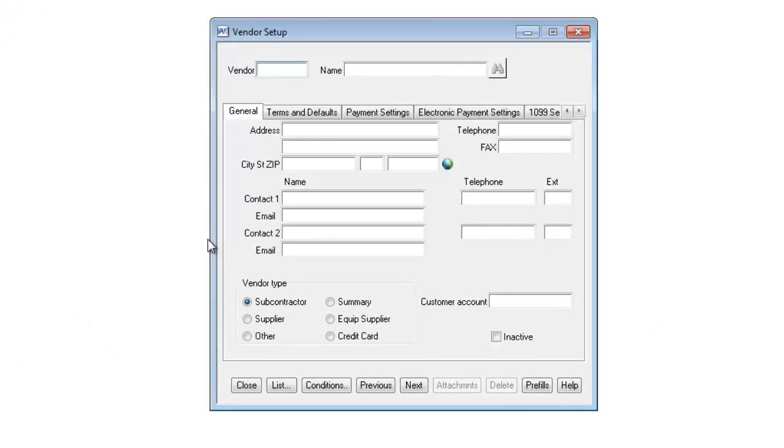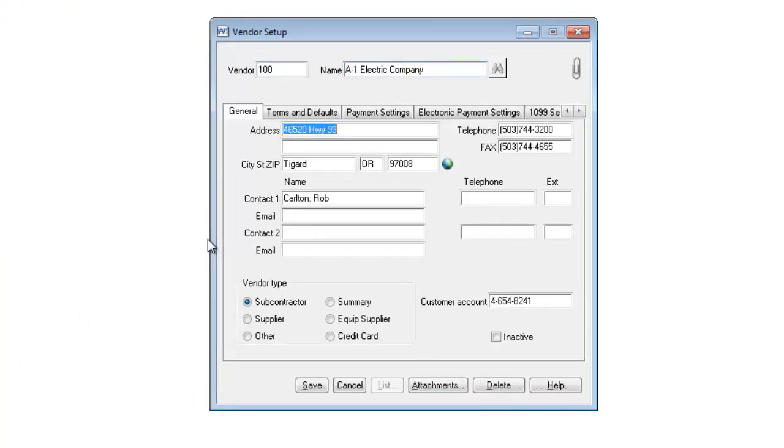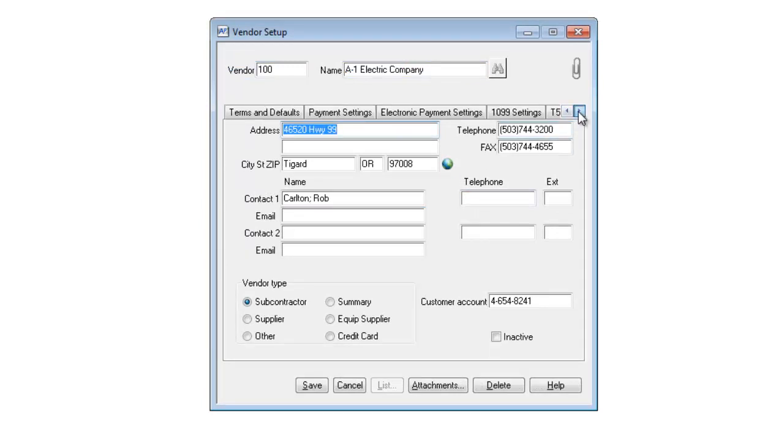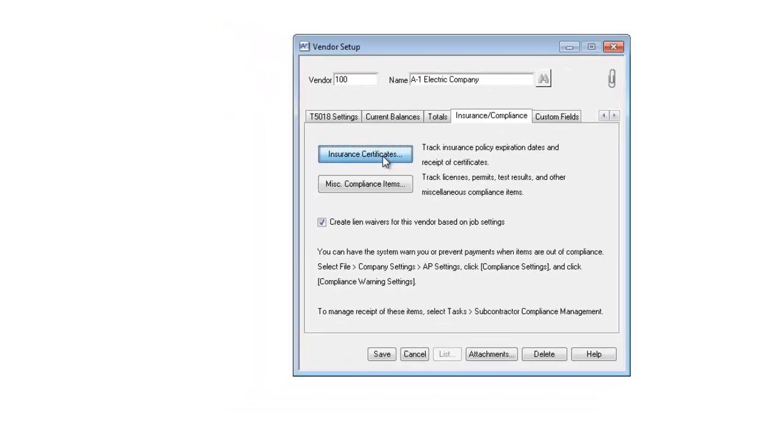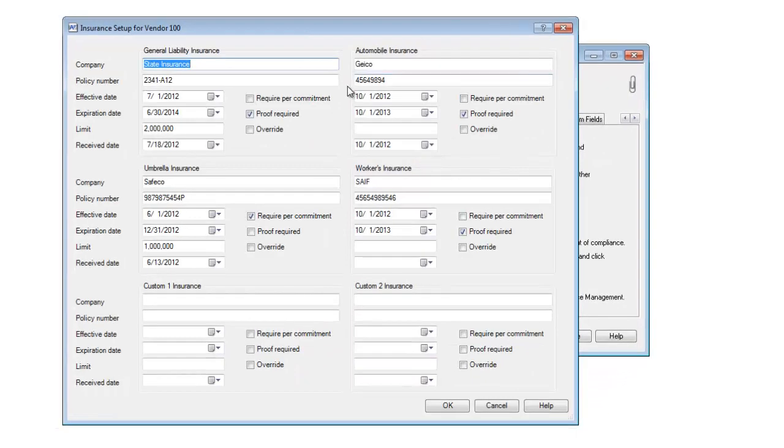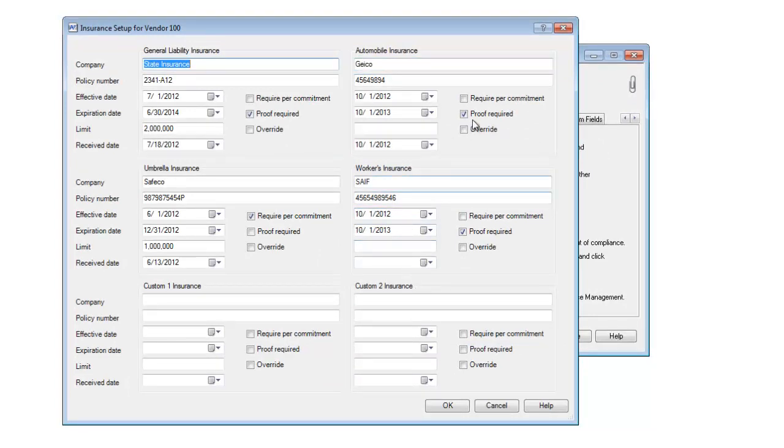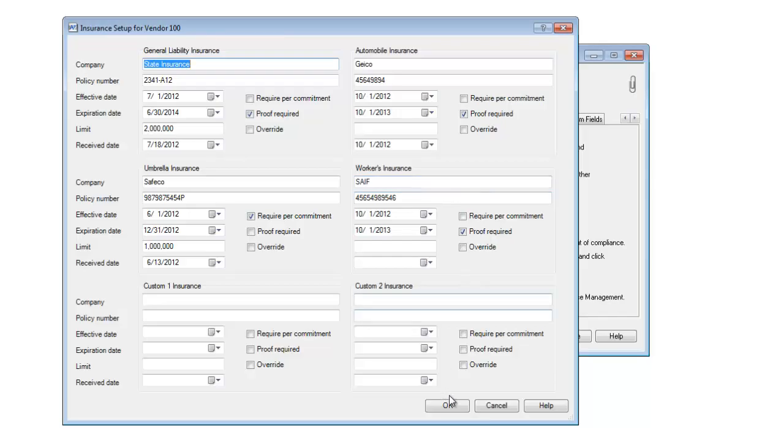If I go to Setup and Vendors, I'm going to pull up my vendor, A1 Electric. If I scroll over here to the right, I'm going to see a new tab, Insurance and Compliance. If I click on that, I can hit Insurance, enter in all their insurance certificates and expiration dates, whether I require proof of insurance, and whether or not I require it per each commitment that I have with this particular vendor.